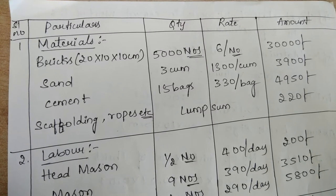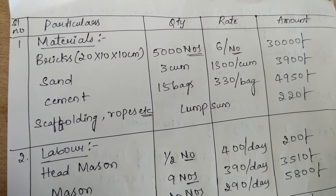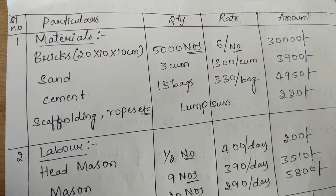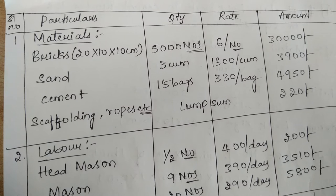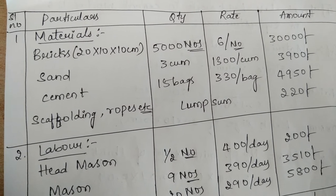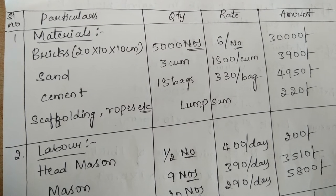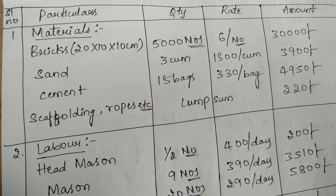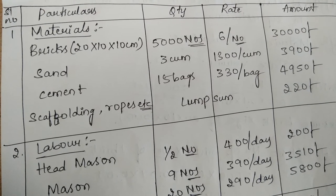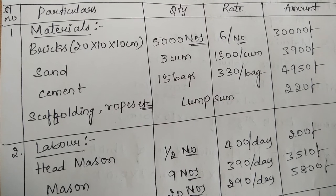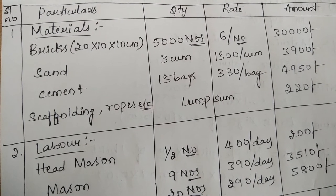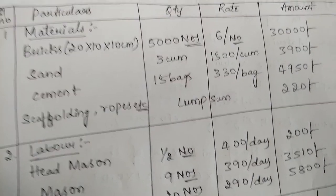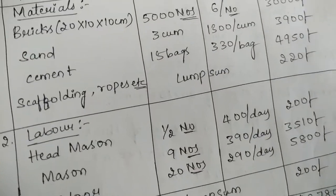Now let us draw the table for the rate analysis. The table should consist of serial number, particulars, quantity, rate as well as amount. The table will be divided into three parts: material quantity, labor quantity, and contingency quantity. In the material quantity, as we are doing for first class brick work, the materials required are bricks, sand, cement, as well as scaffolding and ropes for the construction of superstructure.